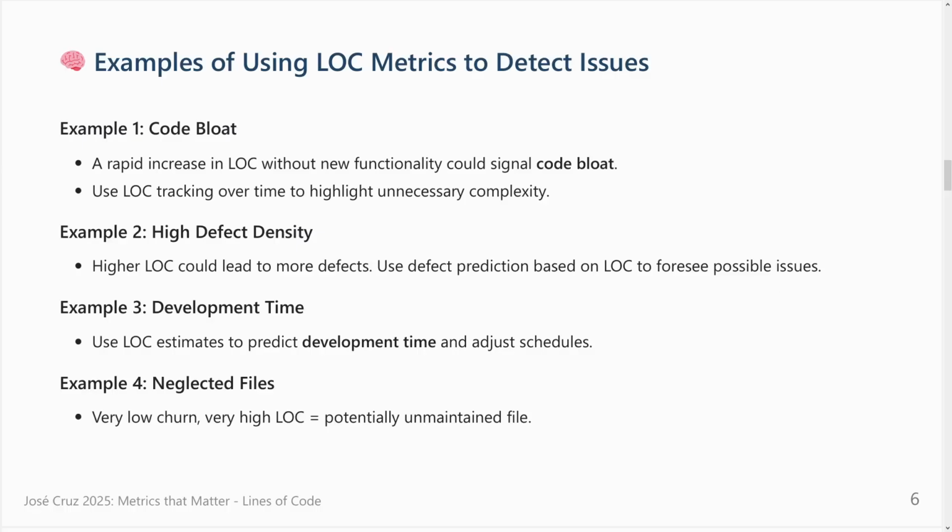So if you start to imagine that you are in Excel and you count the number of rows every week, and then you ask the quality team to give you the number of defects, and you start to see if there is a linear or a log trend line, and this allows you to guess what you expect in the future. Because the code is the same application, the same project, usually the same persons, so they behave the same. Maybe the bugs will be related.